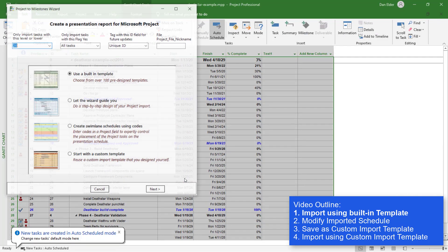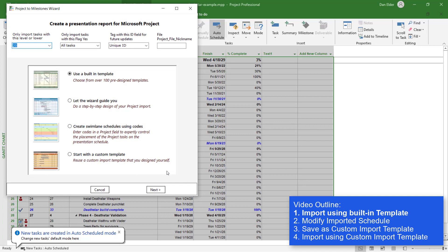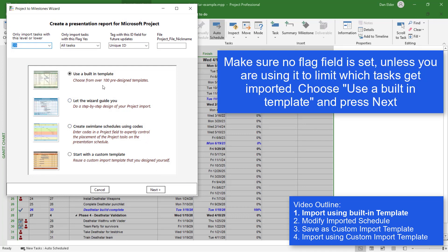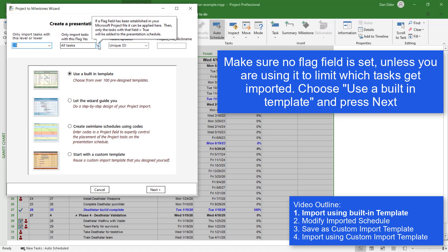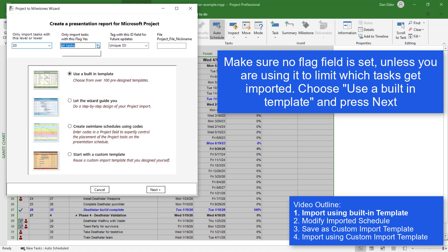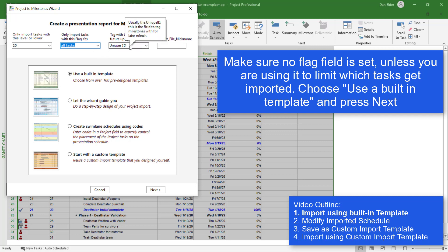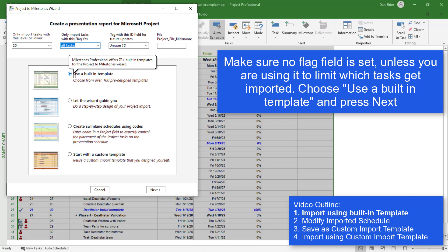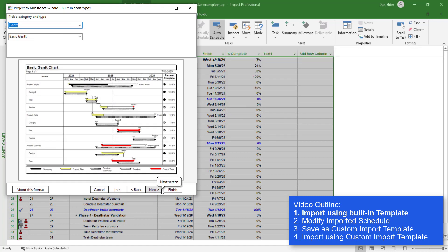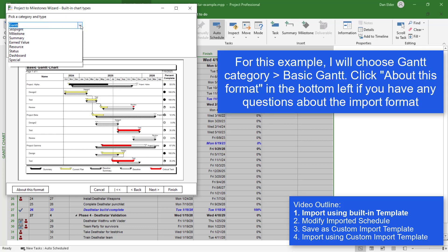It opens up your MPP file in the background, and now I'm going to use a built-in template. I'm going to make sure I don't have a flag field set — that is one way to limit what you import. You can set up a flag field and set each task to yes or no if you want to limit what you import. I'm also going to have Unique ID for the tag, and then I'm going to choose Use a Built-in Template. I'm going to press Next, and for this one I'm just going to choose a Gantt category and Basic Gantt type.